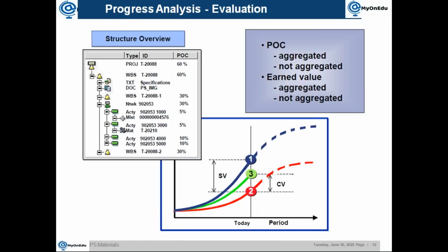It's like you are doing a calculation and keeping it in memory, the concept for the POC. So you need to run it, and the value will be there. Then you run it again next month, so it will recalculate it and give you the latest value. For example, if you are creating a version and you want to see what the latest POC was at that point of time, you need to calculate the POC first, then create the version. Otherwise, the updated POC value will not be there, you will not be able to find it in the version if you create the version before calculation. So that is one thing you need to see.